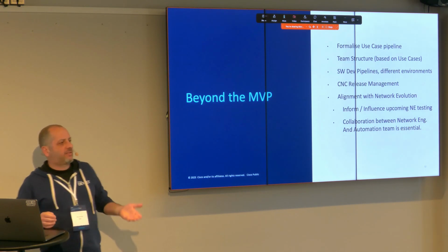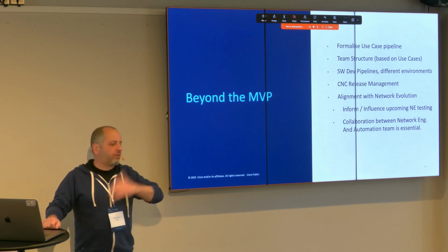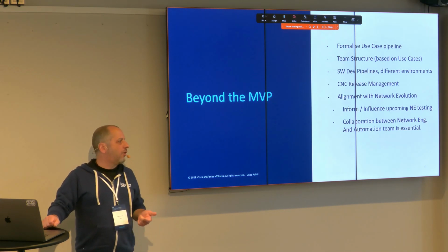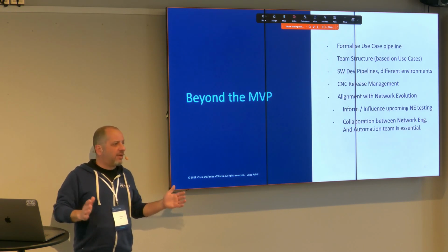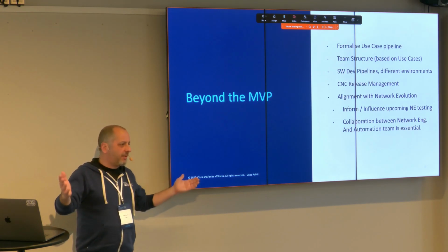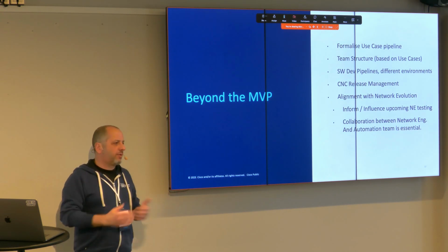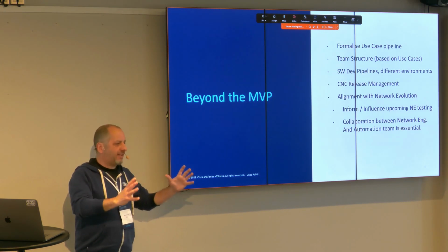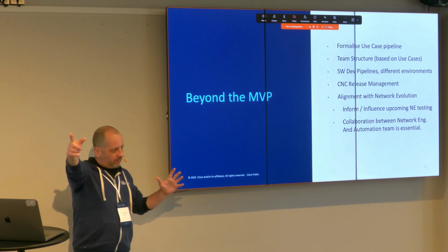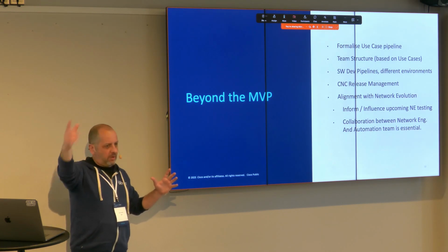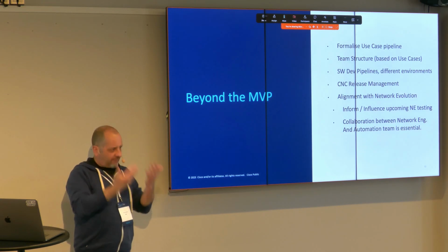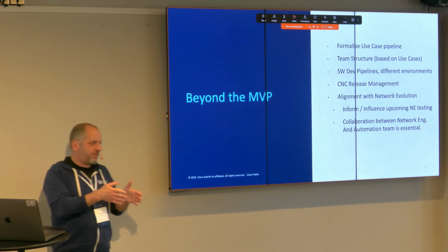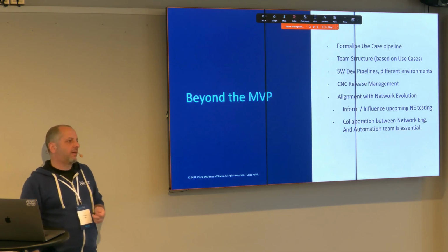No, it depends on the readiness of the devices. You cannot onboard, I don't know, 20,000 devices if only 500 of them have the features that you need, right? So this has an impact on the sizing of the platform. So it depends if you already have resources available. Say that you have infinite virtual infrastructure resources, then you can very well deploy the full platform footprint with your target to onboard the whole network over time, right? But you don't have to. Depending on your hardware procurement times, depending on the available resources that you have, you can plan it in steps. It really depends.